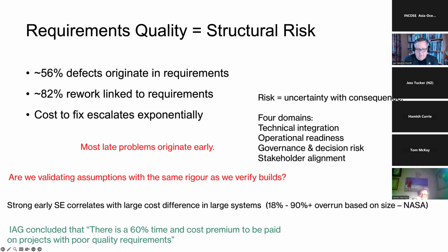We spent a fair amount of time and money, sometimes to the great dismay of the military client, on validating assumptions on the client side and working through possible iterations and different pathways that they might take as we all gather new insight. It paid back handsomely, because once we started doing the simulation and they could see what was happening, they could make really good decisions, and we didn't have a massive escalation of the cost of the project towards the end.